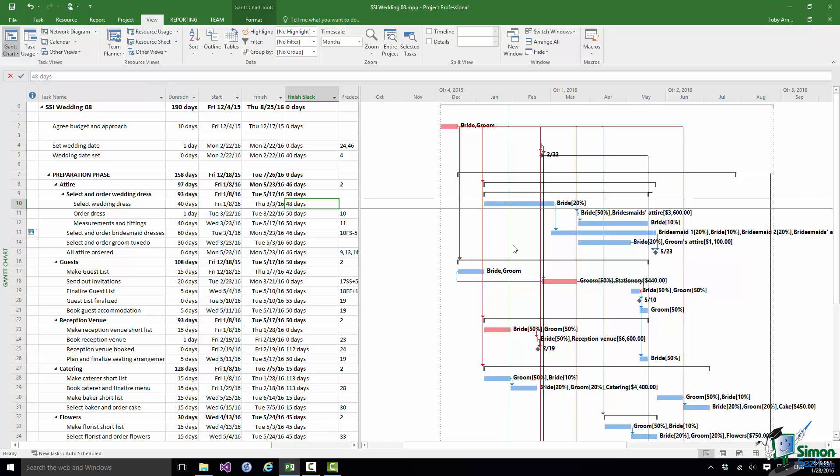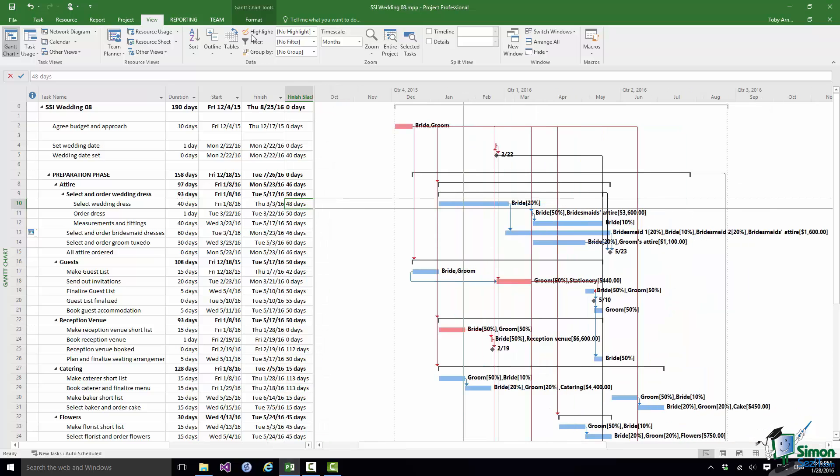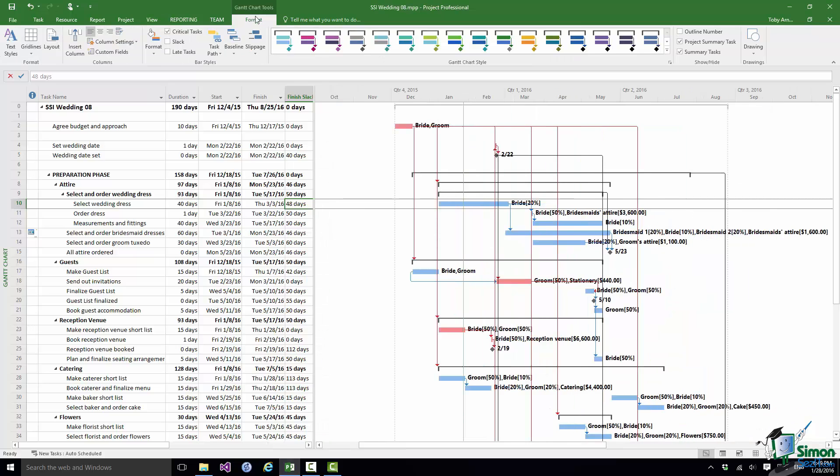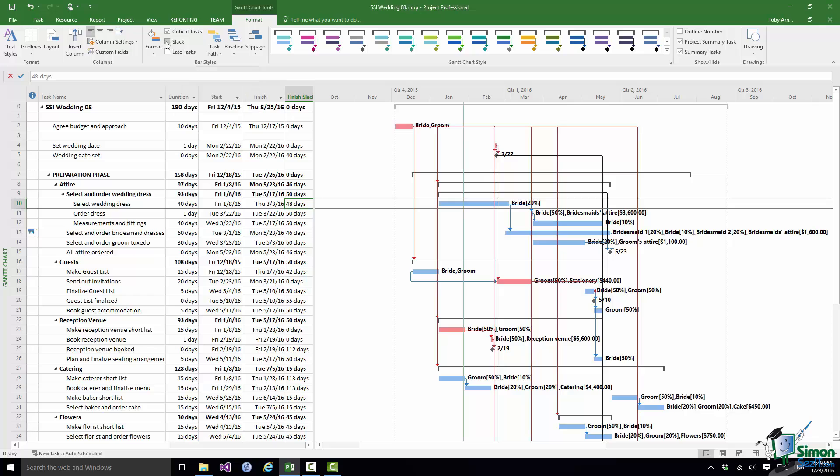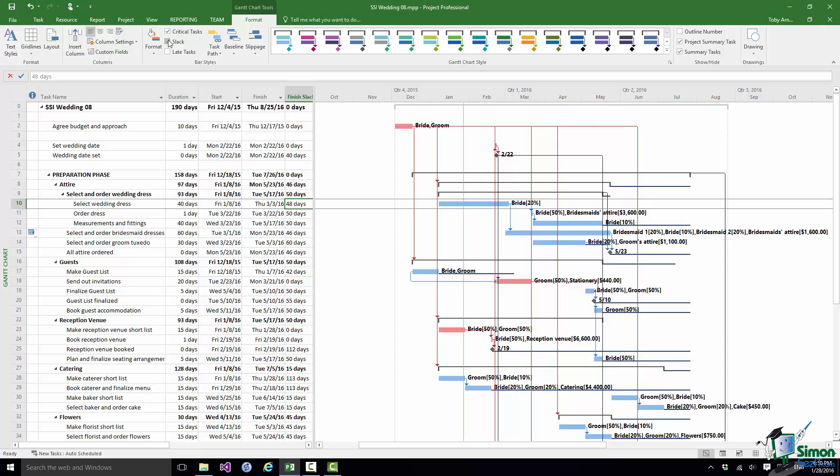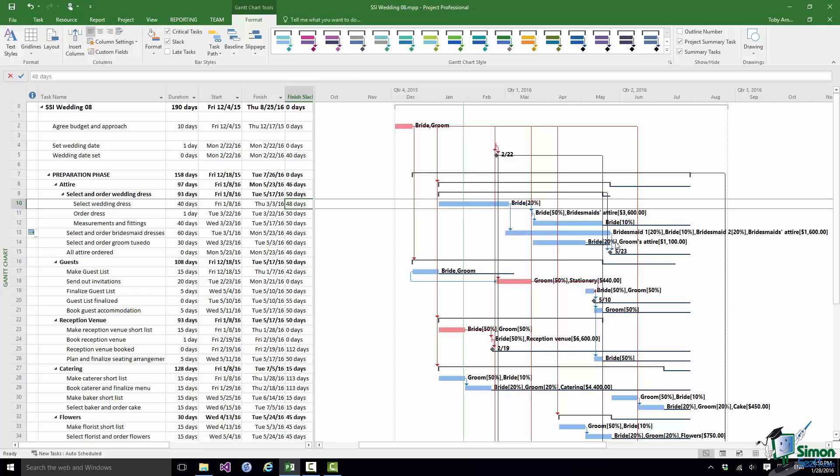Something else that you might well find useful, again if I go to the Gantt Chart Tools Format tab underneath the Critical Tasks checkbox in the Bar Styles group there is a Slack checkbox. And if you enable that for each task you will see a visual indicator of its Slack. Now of course for the critical tasks there is no Slack. But if you look down at other tasks you'll see a line. If you take for example this one, Measurement and Fittings, look at that line that goes out to the right hand end, the black line. And it indicates the Slack on that particular task. The Slack also shows on summary tasks so the various summary tasks within the preparation phase you can see how much Slack there is in each of those as well. So that again gives you a good visual indicator of how much Slack there is in individual tasks within your schedule.